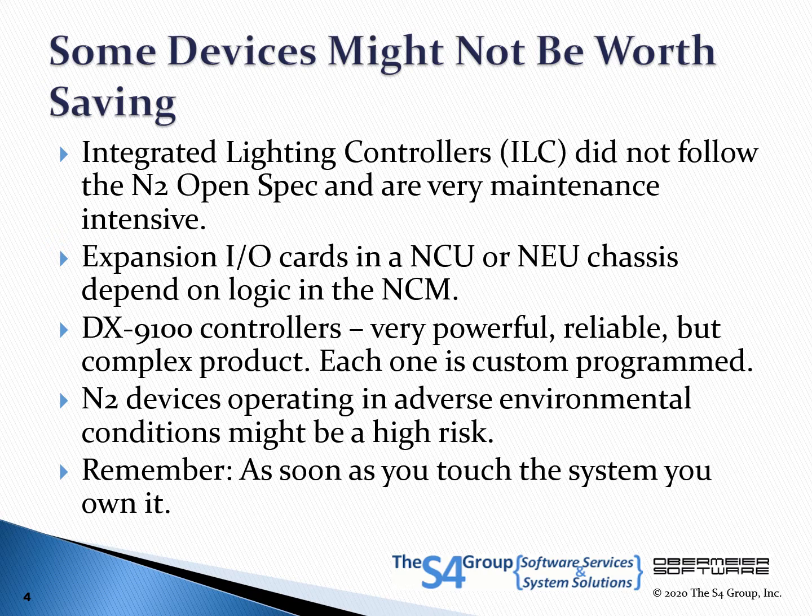Not every device can or should be integrated. When doing your site inventory, don't just look for devices that are no longer operational. Also consider those at high risk for future failure, like those that are in locations of high exposure. Also, consider replacing obsolete devices, such as integrated lighting controllers, or ILCs.